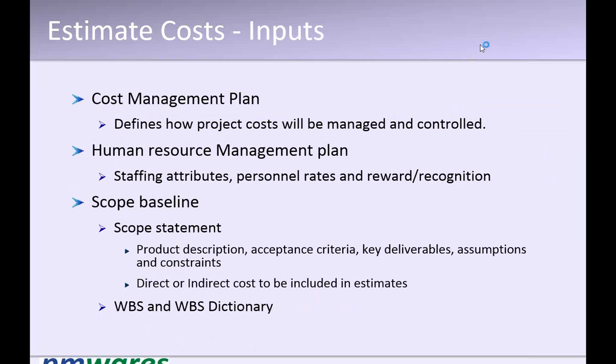So travel and all that will not be a fixed cost, because due to that particular project, the resource has traveled. Travel is a variable cost. Only capital expenditure is fixed cost. CapEx and OpEx: OpEx is variable cost, CapEx is fixed cost.